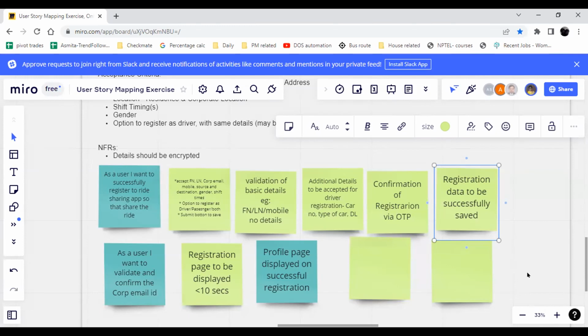Okay. Sometimes there can be situations where the team feels that we need some more information about it, and they come to the product owner and the scrum master saying that we might need a spike so that we can go ahead with our research and come back with our findings, and then we will know if we need another story or some more information. And we were talking about the gaps, right? So probably during those discussions, that is when we will understand there are some more gaps that need to be filled. So even the team can go to the PO. Not always that the PO would come up with a spike. Usually spikes are requested by the dev teams. Got it. Okay. Yeah, cool.